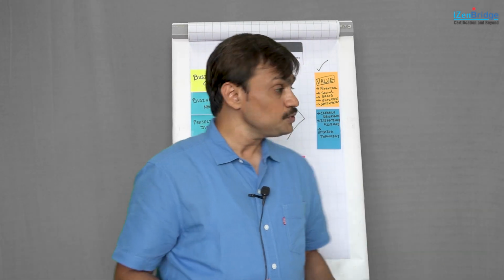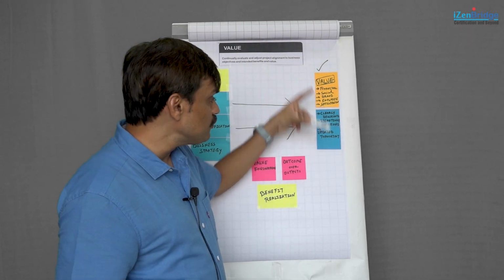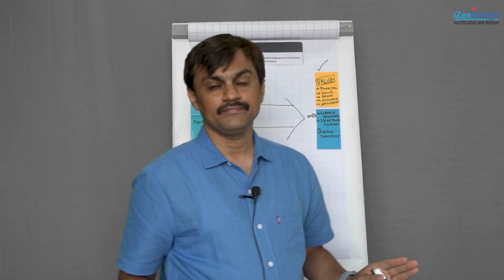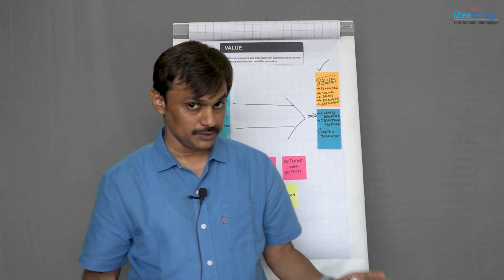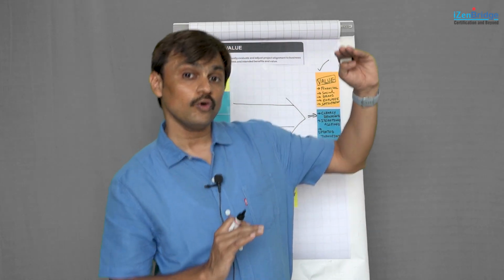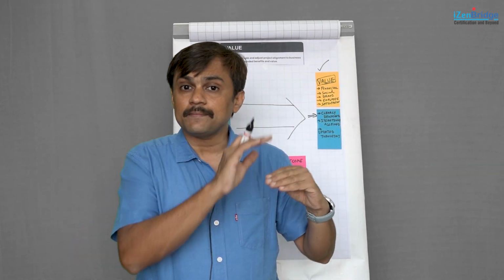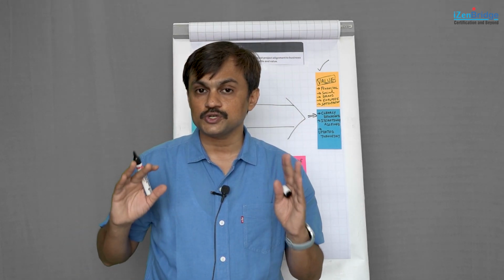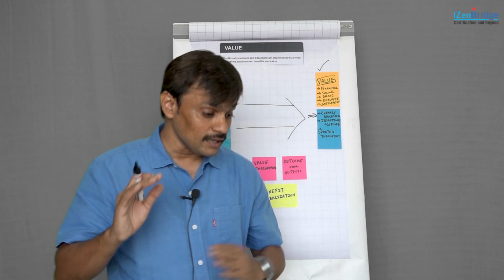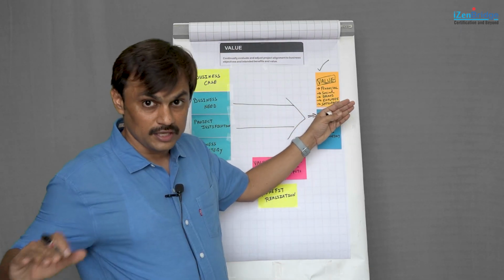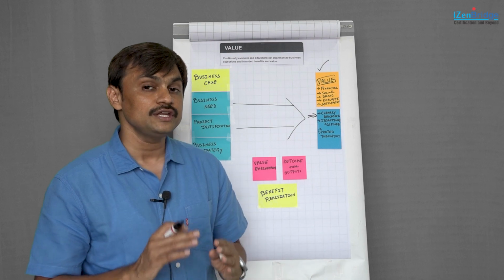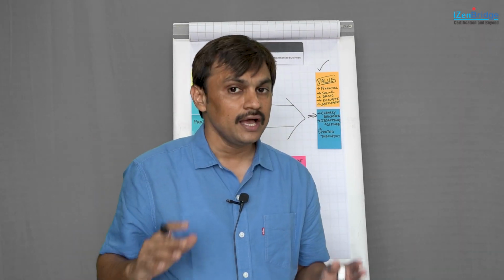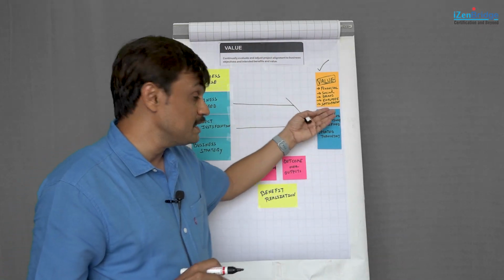Now, in order to produce a project aligned to a value, first I need to clearly describe the value. I must have clarity that okay, these are the 5 things we value, this is valued more over the others, this much is the basic threshold we should meet. For example, I may say that for environmental consideration I should not be breaking any laws, but beyond that I should be focusing on profitability, but breaking the law is not acceptable. So, we need to identify a threshold value, a minimum value for various value dimensions, and may need to identify which one is more prioritized over the other.